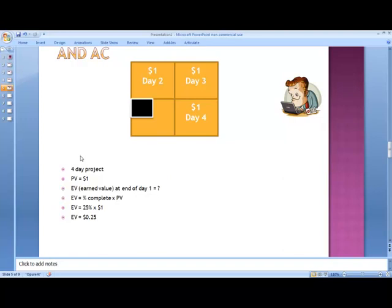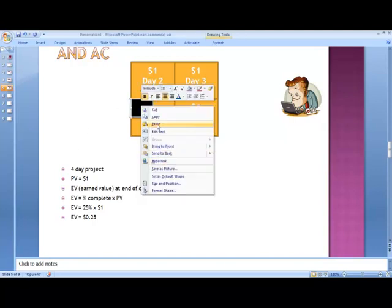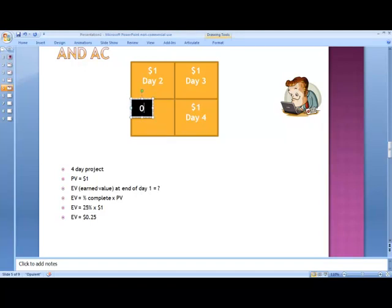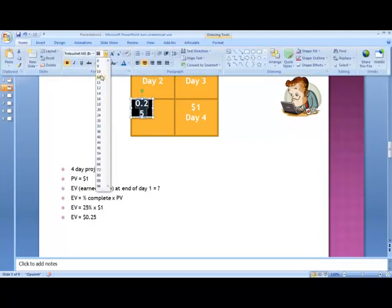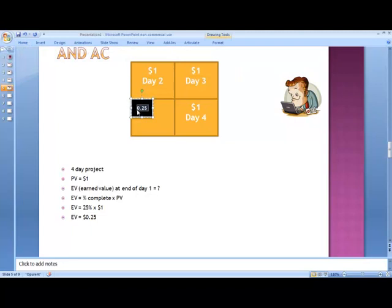That's our earned value. Earned value is a measure of how much work did you actually get done, what is the value of that work. And you can see the value of this work right here is 25 cents. Let me make this a little bit smaller so that you can see it. So at the end of day one, earned value is 25 cents.